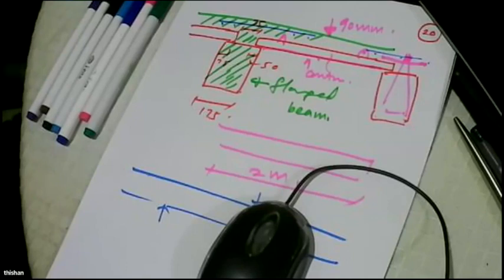And I can give you one example. In 2015, I had to deliver 50,000 square feet in 2 months for a hospital project. I designed a building with concrete floors on steel beams, composite systems, and I used precast, pre-stressed concrete slabs. Do you know what is the thickness of the slab for a 6 meter span? 90 millimeter. And even today, you can go there, and there are absolutely no vibrations in the structure.